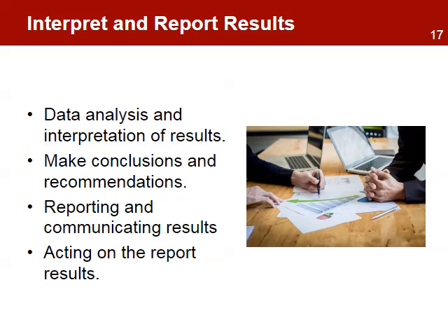The final step of the monitoring process is the interpretation of the data and reporting the results to key stakeholders. Analysis includes qualitative and quantitative analysis of the data collected, looking for trends, deviations, and changes. The project manager and the team will make conclusions and recommendations that will be incorporated in a report and communicated to key stakeholders. The results of the report will help make decisions to improve the performance of the project interventions and even improvements of the monitoring process.